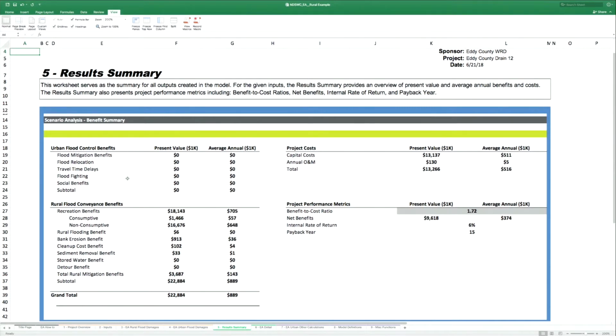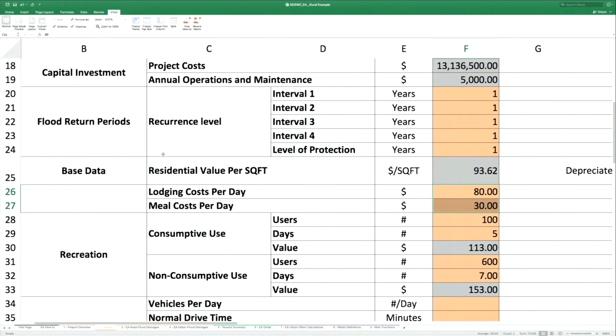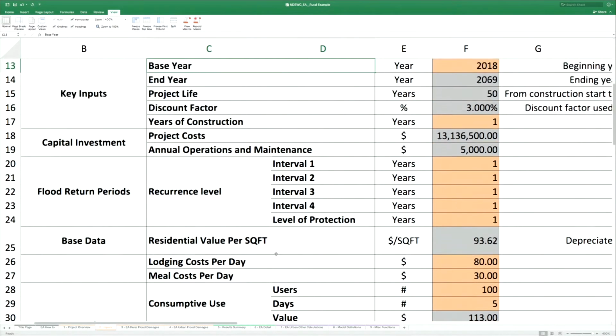But the number that you multiply the 1,000 acres times is $100 an acre average annual flood damages. That's an empirically derived number. That's a real number from Norman County, Minnesota. And in North Dakota counties, we adjusted based on average county rental rates. The cost for ditch maintenance, those are all real numbers as well. The only numbers we made up were the number of acres that were affected and the feet of ditch that was affected. The costs, the damages, the cost to repair are real numbers.